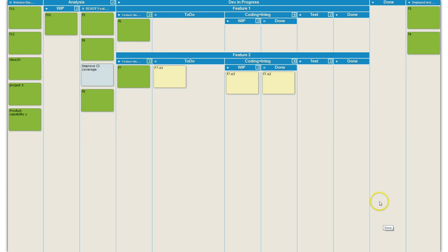And this cycle continues and continues, and the last step is that now we have a place to maybe work on another feature to be ready, just so we don't run out of features. Maybe with time we understand that our analysis is so fast that we can actually get fairly well along with just 3 features that are ready, and we can reduce the WIP limit here, which will accelerate the time to market that we have. Those are the things that we want to improve over time.